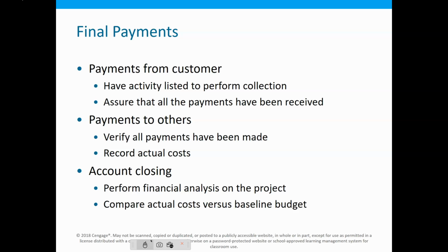How would you like to buy a new house, just spend $300,000 on it, and then get a bill for $20,000 in concrete, and they say, well, you're either going to pay it or we put a lien against your house that's going to sit there and you can't ever sell your house. And that can happen. So that's why those accounting people are very important, making sure that all those payments are made. So finally, at the end, we close all those out.